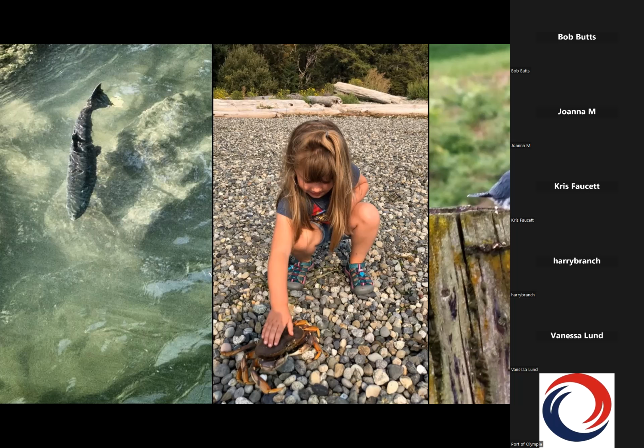When we go into a core, like you were asking before, if we drive a core into the mud and we start analyzing 1 foot intervals, if we take 5 intervals out of that core and send them to the lab, that's a $10,000 analytical bill for just that one core. And if you figure that we might go out and collect 50 to 100 cores and 50 to 100 surface samples, you can see that we quickly get up to a $1 million lab bill.